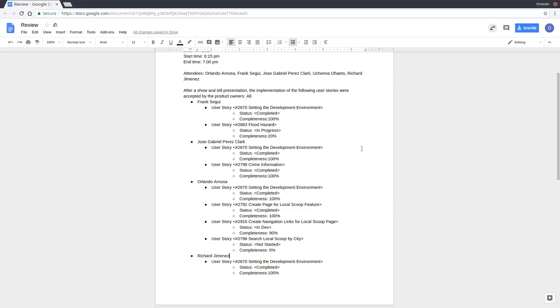Besides that, Frank was working on UserStory 2883, which was the flood hazards. It is still in development, so it will be carried over to the next Sprint. It has a completeness percentage of about 20%.